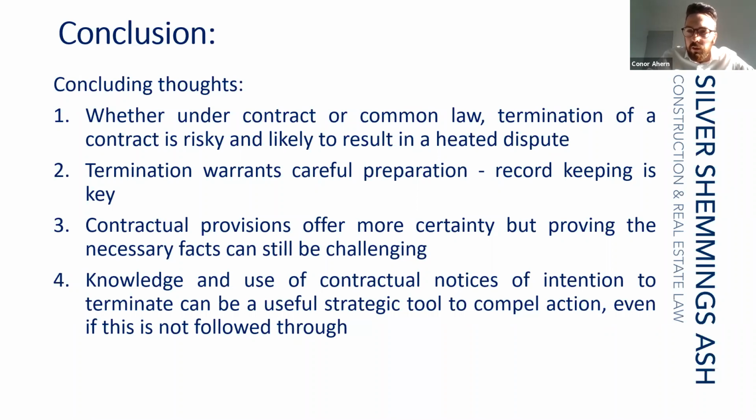So where he may have otherwise requested a contractor to take action, that default notice is a very good tool for the employer to use in order to get the contractor to take notice. Because if the contractor fails to take notice, then if the 14-day cure period expires, the employer can validly terminate and pursue the contractor for damages, which include the increased cost of completing the works. So, a very important point to remember for employers if they have a contractor who is not adhering to notices, and a very good tool to have up your sleeve when you're dealing with termination.